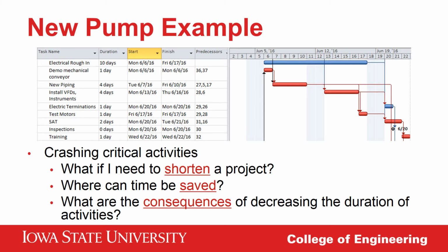Each schedule improvement comes with a cost, and the costs are weighed against their respective gains. The best values are chosen first, and the decision becomes strictly algebraic. And that, my fellow engineering managers, is one simple example of how you can crash the critical path to shorten an event.